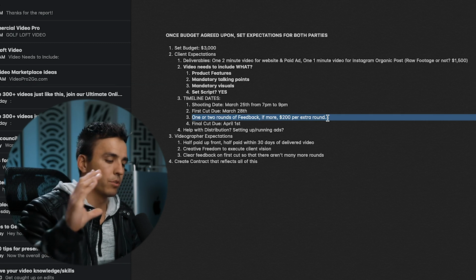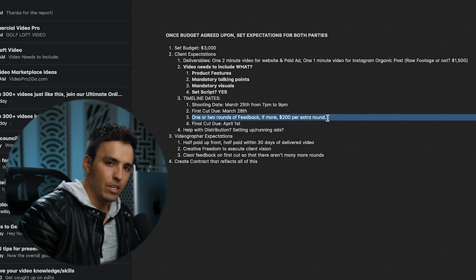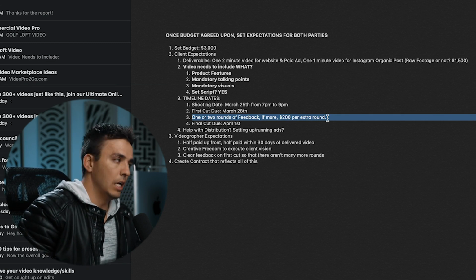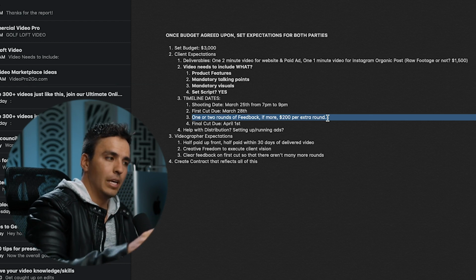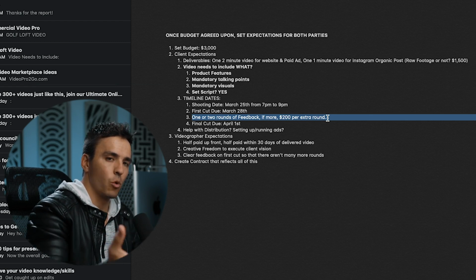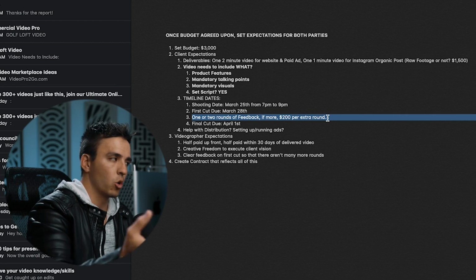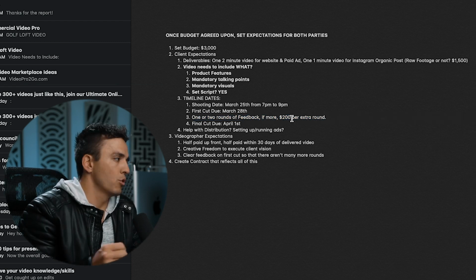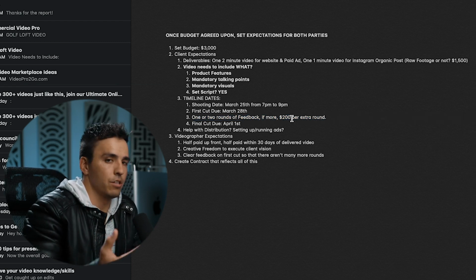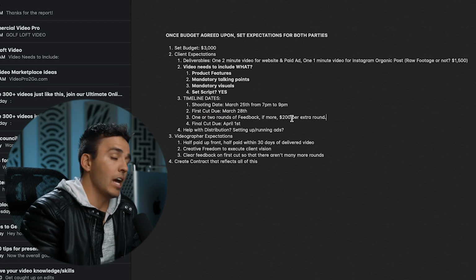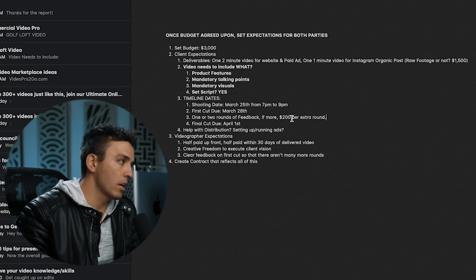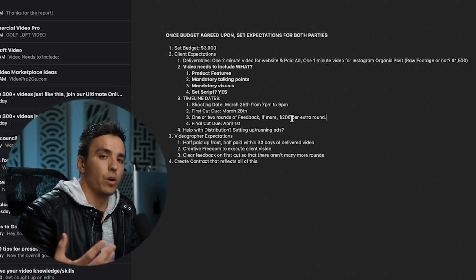So make sure you're able to always go back and say, this isn't what we initially discussed. I've delivered on that. If you're wanting something different and new, it is going to cost you more because I'm going to have to go reshoot that, or I'm going to have to re-edit that according to these new specifications. So don't be afraid to say that, as long as you're meeting expectations that, hey, I'm happy to do more beyond what we discussed and what we agreed upon, but know that it is going to cost you more.